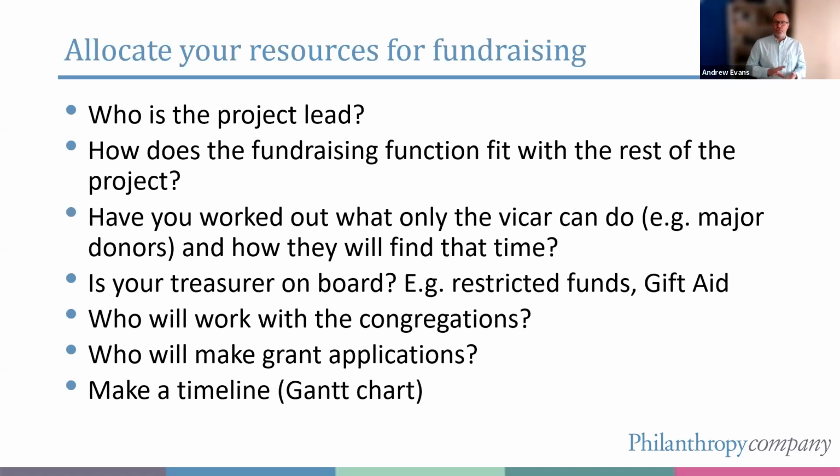Fourth question to ask is, is your treasurer on board? So if you're going to run a fundraising project, you're going to have money coming in that might need to go into restricted funds because it's specifically for that project. You're going to need to make sure that perhaps new donors who haven't given before have got all their Gift Aid forms. So your treasurer and that sort of finance team are going to need to be on board with the project and connected into it, because it's not just the fundraising, there's also a finance element.